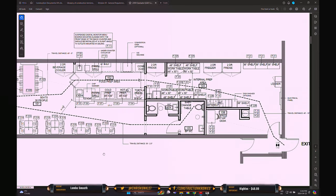But yeah, these glazing walls, like you can see these dashed lines, you've got to watch out for on blueprints, right? Because that means something. And when you see a dashed line between the wall and the glazing, you know it's a drywall return all the way around the window. There's a drywall return, so that's expensive, okay? I charge $500 to finish every window, $500 minimum, depending on how big it is. But yeah, that's $500 right there if you miss that, okay?